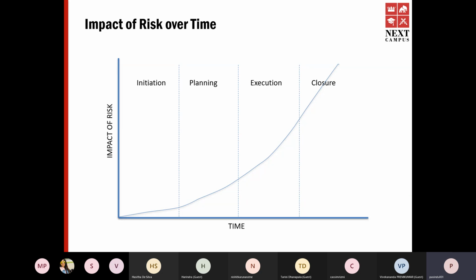So at that stage, if you want to change it even fully, you don't have much of an impact. You have not spent enough money. You don't have any wastages, right? So impact is lesser at the beginning. But once you do the finishing and everything, you've done 3 rooms, you have 2 en suites, and you wanted the third room also to have an attached bathroom. Okay.